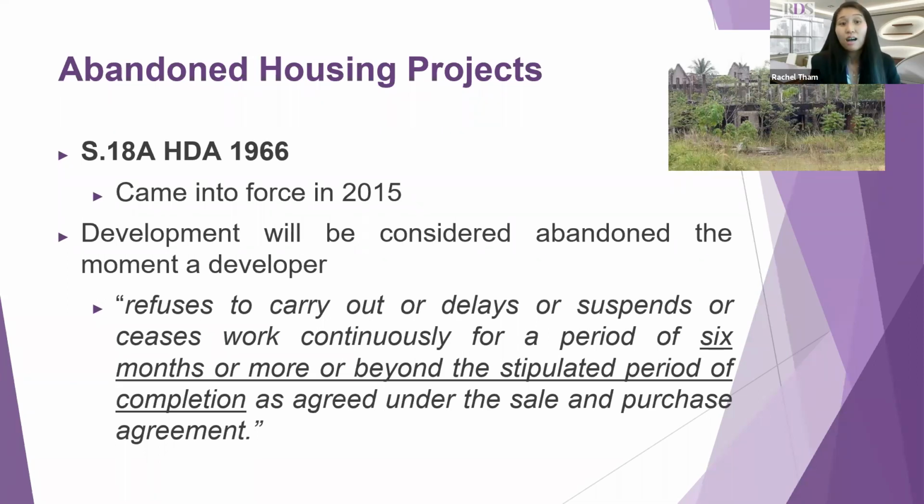So firstly, how does the Act define an abandonment? Abandon means refuse to carry out or delay or suspend or cease work continuously for a period of 6 months or more beyond the stipulated period of completion as agreed under the sale and purchase agreement.